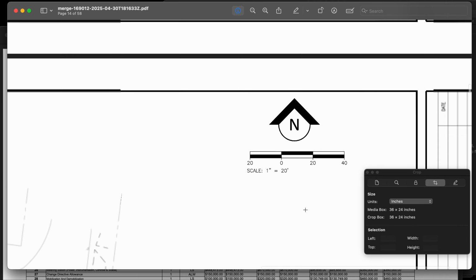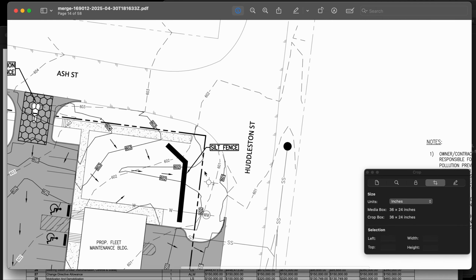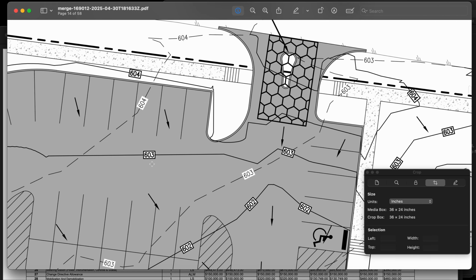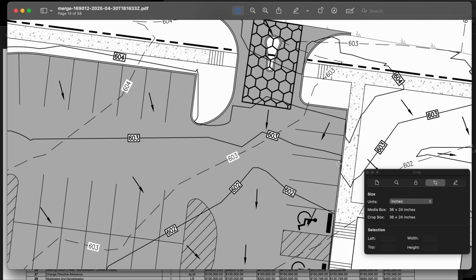So now I know that the scale is correct, and then also, just to double check, I know that a parking lot is around 18 feet in length. So it should be 0.95 in the width. So if you go down here, we measure, it's 0.93. So it's perfectly fine. If it wasn't to scale, it would say 0.2, or it would say just anything else that's not close to 0.95.